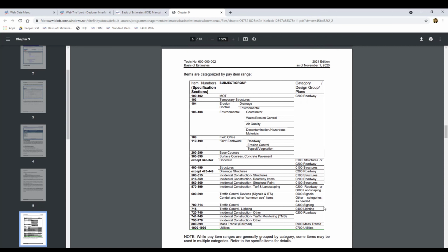more than one group. Since we're uploading the quantities by summary table, each summary table will only have one group ID that it belongs to. So unless your project has unique group numbers, as sometimes happens in structures, they should usually fall into the default groups. If you need to check to confirm the right grouping, this is where that information is located.